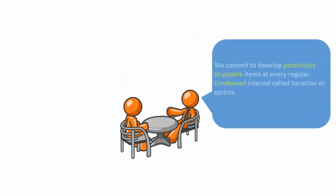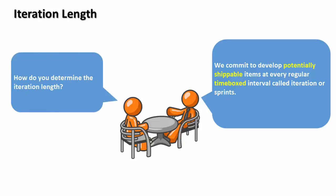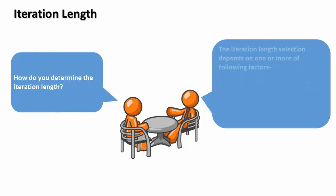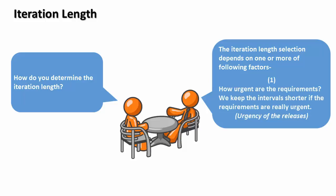We commit to develop potentially shippable items at every regular time-boxed interval called iteration or sprint. How do you determine the iteration length? The iteration length selection depends on one or more factors. Number one: how urgent are the requirements? We keep the intervals shorter if the requirements are really urgent.